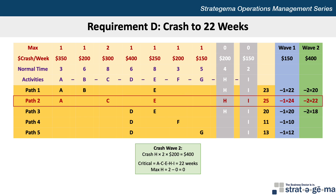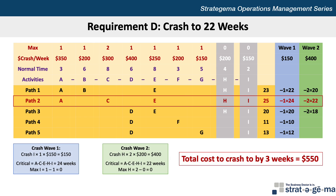The critical path remains A-C-E-H-I, which is now 22 weeks, and we've completed our objective of getting the project down to 22 weeks at a total cost of $550 in two waves by crashing I by one week and H by two weeks.